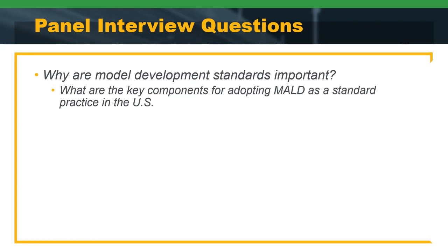Well, I think it starts with, as we were already talking about, what is the acceptable use of this information I'm providing, right? And what is the use case that I'm focusing on? And it really starts back at scoping. And when we start looking at these parts of a model development standard, level of development is one of the foundational pieces, and you try to build base definitions on that can apply not just at a job level, but going back down at an agency level and then even at a national standard. So in the JTCS, we talk a lot more about this national standard. So something that ties back to, if you look at special provisions on a project, and then you have your agency spec book, and then you have the Code of Federal Requirements, right? That same structure. And so a lot of this stuff gets built out of those different areas.